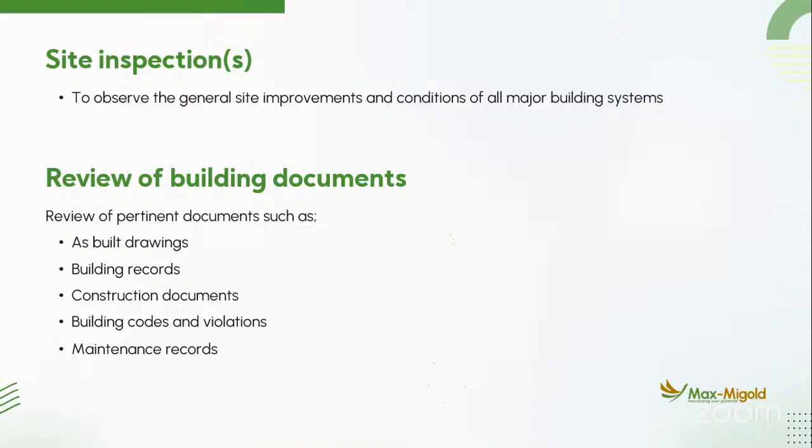So when you are conducting a new project, as a facility manager, you need to make sure you include it as part of your terms and conditions for the project construction company that at the end of the project, when they're handing the project back to you, they should hand it over alongside the as-built drawing. It is very, very key.